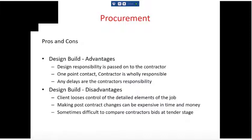And finally, the way the contract works is any delays are up to the contractor. So like that situation I just described to you about the lights coming from Italy, that may well happen. It may well be that between the architect and the contractor they hadn't clocked that Italy's going to go to sleep in August. But that delay of 2 weeks, it's not the client's problem. It's the contractor's problem. So either they're going to work through the night in order to get the thing finished,